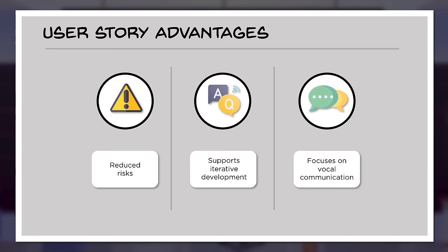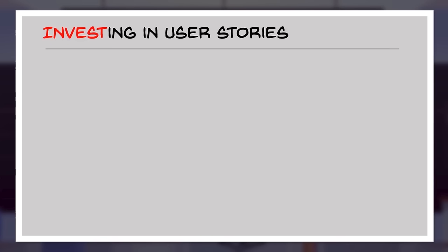INVEST in user stories. So what is INVEST? What does that mean? It is a concept that helps in creating meaningful user stories. It stands for independent, negotiable, valuable, estimable, sized appropriately, testable.